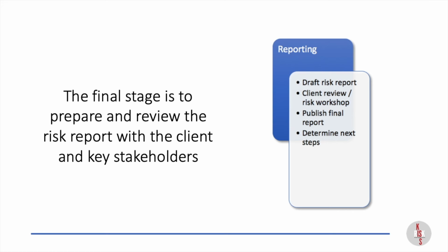If you remember back to the first session when I talked about risk statements, this is where risk statements can be very, very powerful. So you could have a prose report with all of your risk statements written out, describing the risks in detail. And alongside that, you could have some metrics, some graphs. So again, it's a very comprehensive way to produce the report. But the key thing is you're going to produce the report, and you will have identified what that should look like early on in the process. That should have been identified way back when you were planning out the assessment itself.